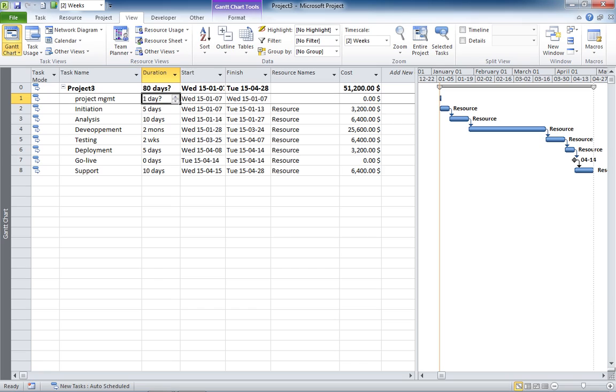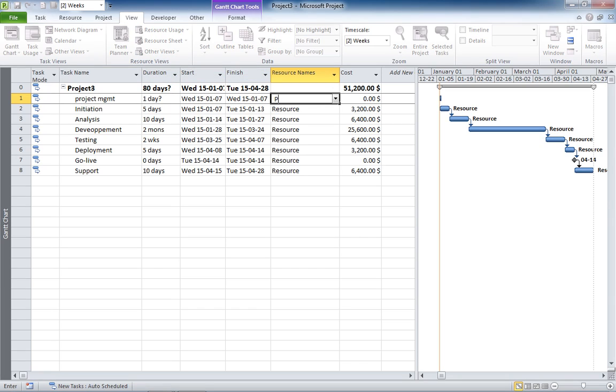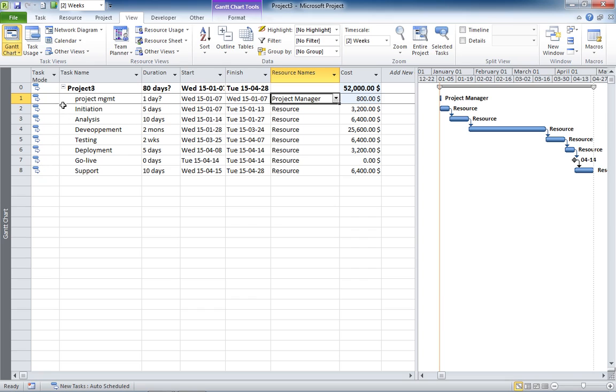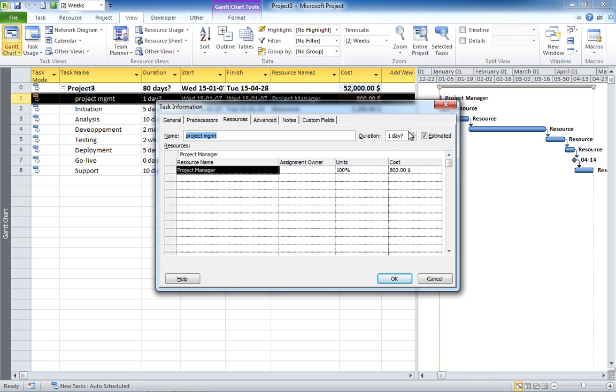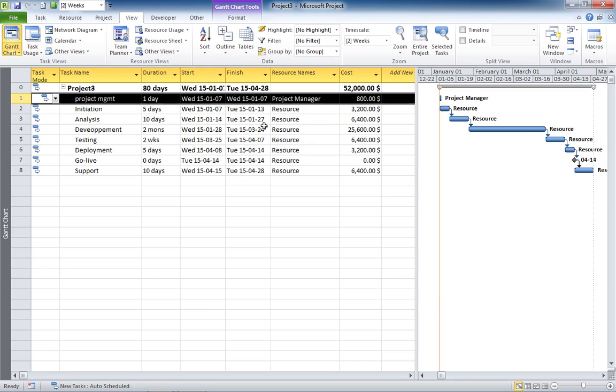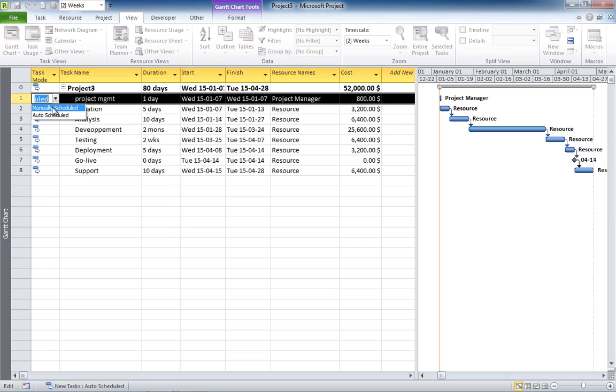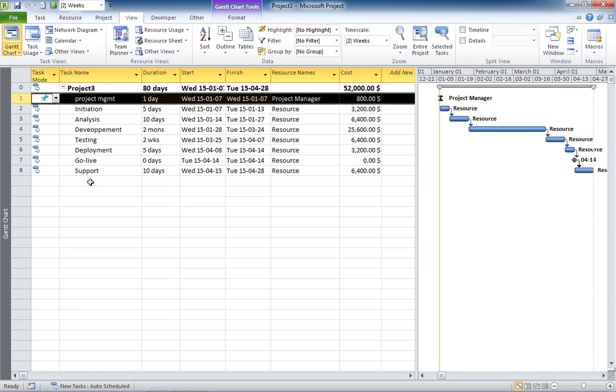So here's the task, we're going to assign the PM to it. And we're going to remove the fact that it is an estimation. Now, the trick here is that you need to specify this task as manually scheduled.